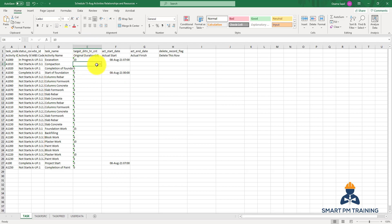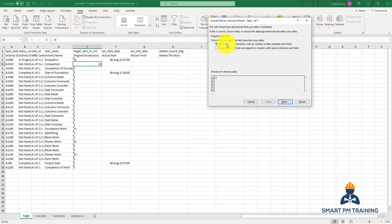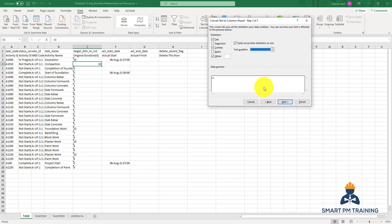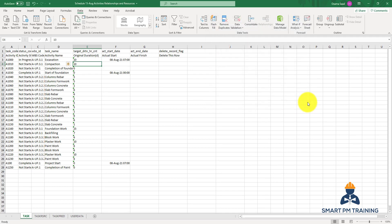To convert a number to the correct text format Primavera expects, click on the cell with the value, go to Data > Text to Columns. Select Delimited, click Next, check Comma and Other, type the pipe symbol from your keyboard, check 'Treat consecutive delimiters as one', set text qualifier to the second option, click Next, change the column data format to Text, and click Finish. Now it is text format.